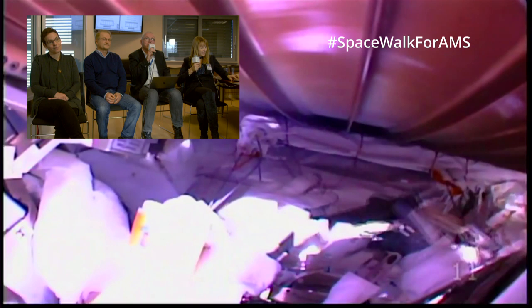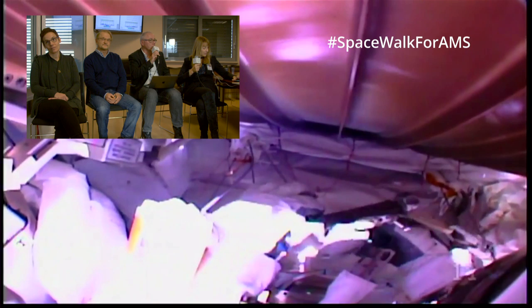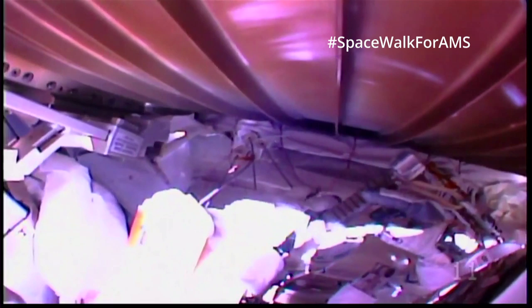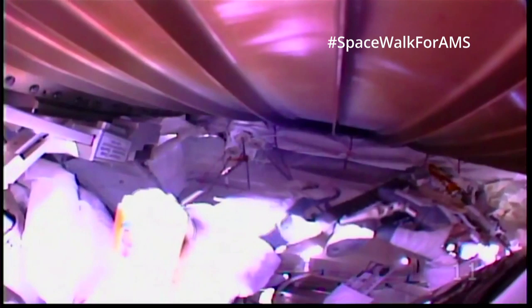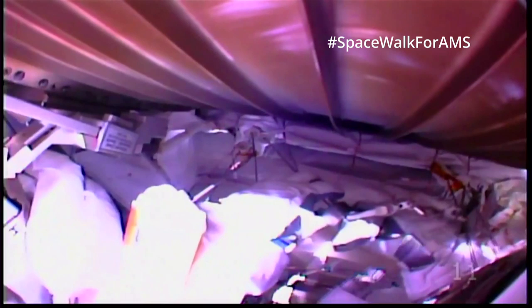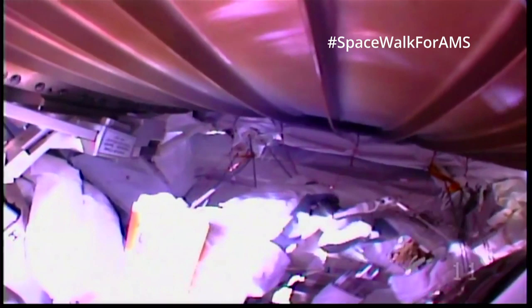Less difficult for the astronauts because it's a simple verification, but definitely a tough time for us also, because for the moving parts of the pumps, we will have to verify that they have been able to withstand the mechanical stresses at the launch. And the last step they will have to do is to cover everything with what is called MLI, multi-layer insulator, a blanket that covers the hardware to avoid direct sunlight impinging on the box, because this will also generate heat load on the UTTPS itself, and this is not good for the performance of the system.